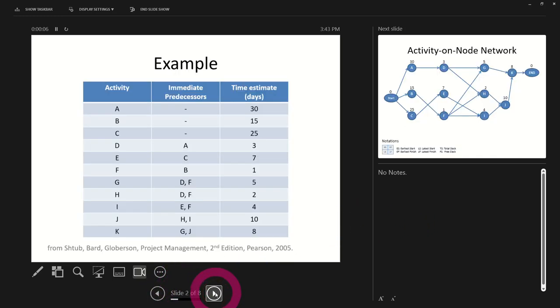All right, so this here is a more involved type of project. Here's our activities, and then here we have, A must be for D. Okay, so before you could do D, you must complete A. So if we go look over here, here's D, and notice A is right before it. Okay, this is going to be on the next slide. But then E, we have to have C. So here's E down here.